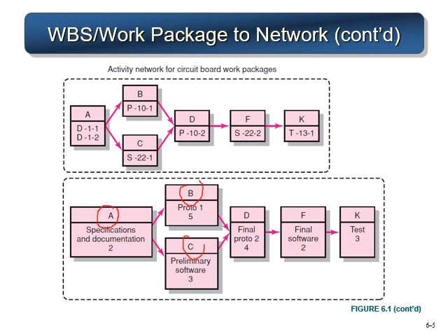The first thing you should understand is that you have a predecessor activity. A is the predecessor of activity B, so if activity A is not completed, activity B cannot be started. And activity B and activity C are parallel activities, which means they can be done simultaneously, or both can be executed at the same time.